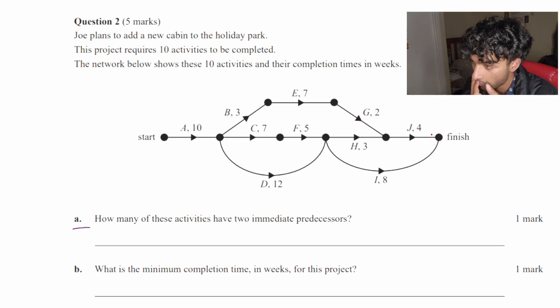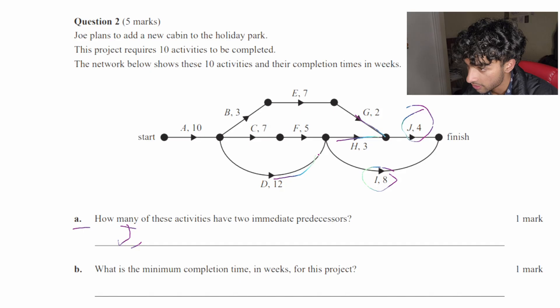So if we look at the first activity, which is on the right, is J. And as you can see, there is two things connected, which means that J is one of the activities that has an immediate predecessor. Then we check I. And as you can see, there's a connection here and a connection here. So that's another activity as a predecessor.